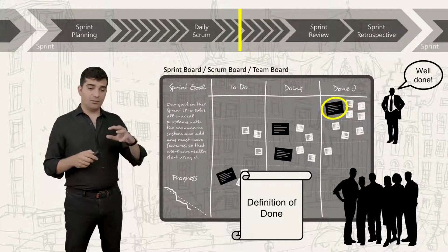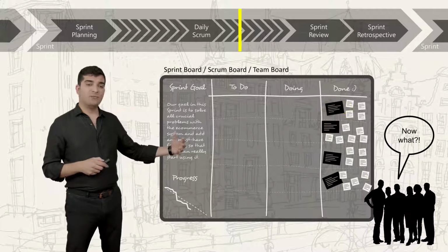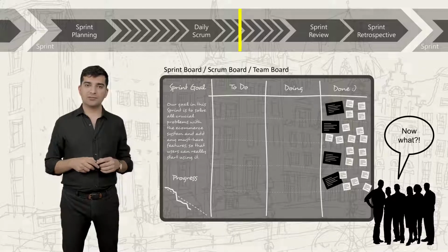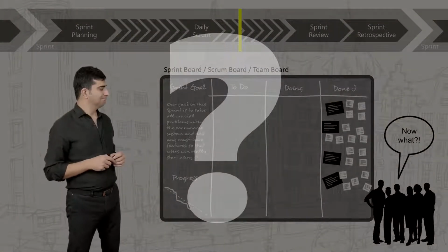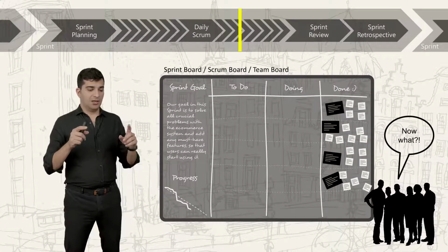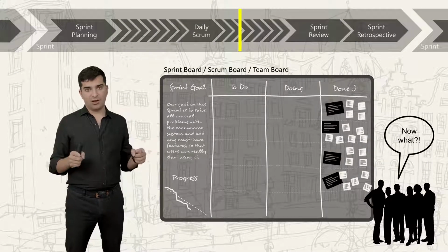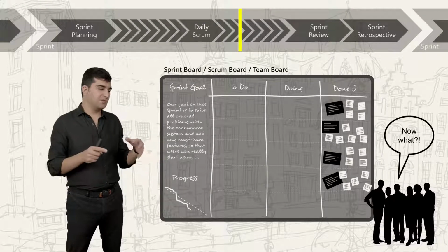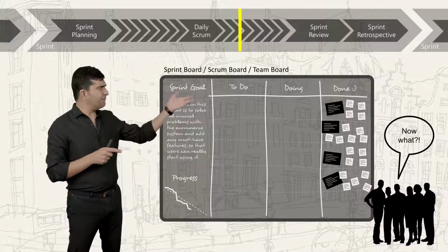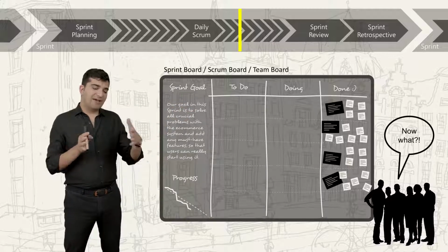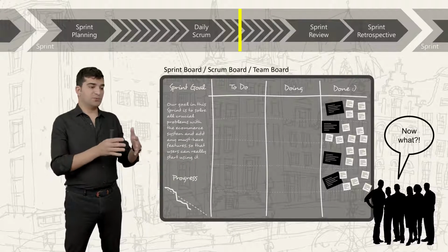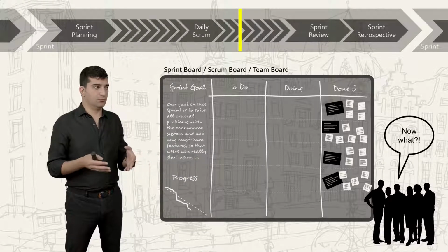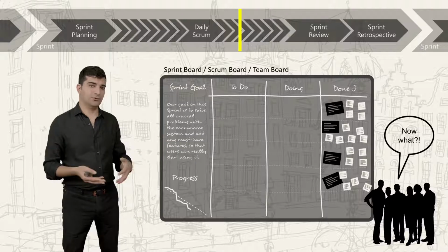Okay, now let's say you're still in the middle of the sprint and you're done with all the items. What would you do next? Okay, first, you remember that the sprints are time boxed and they have a fixed duration. Some time boxes, for example, sprint planning and every other time box that we have here, have a maximum duration. So if your sprint planning is time boxed for 8 hours and you're done in 6 hours, you will just stop the sprint planning meeting and you will go on to the next thing.